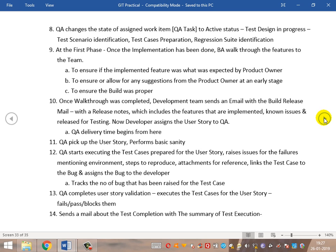QA does a basic sanity and then continues executing the test cases addressed for the user story. They raise issues on failures, documenting steps to reproduce and linking test cases to the bugs, then assign the bugs to the developers. Why link the test case to the bug? When reviewing a test case, you can see the number of bugs associated with it, clearly depicting how many times that test case has failed.